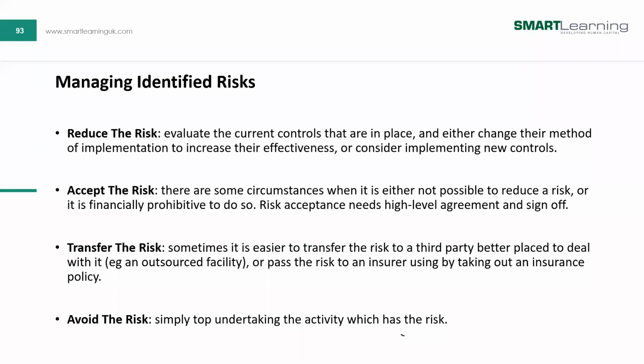Management always are looking for cost savings. So to show your value, you must look at existing controls and whether to keep them. And if they are not effective, then you can suggest, on a cost-benefit basis, new controls. You can also accept the risk if it's within your appetite and implementing controls will be too costly or too difficult to do. Then you can say, let's accept the risk, it is within our appetite, and anything outside of it to treat will be too much.